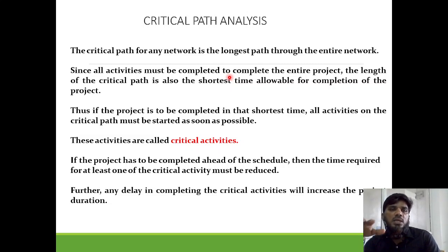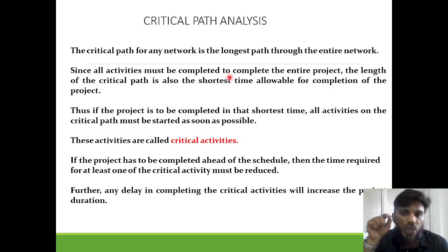of the project. Thus, if the project is to be completed in the shortest time, all activities on the critical path must be started as soon as possible. These activities are called critical activities, which start as early as possible and are completed within a short period of time.